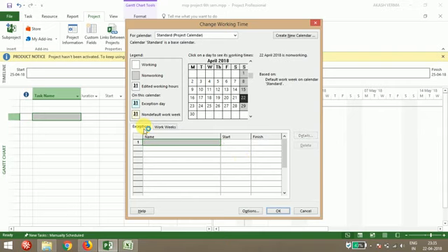Exception day means if there are any holidays between the start date and the finish date of the project, you can give the exception dates. After the start of the project, if you have some holidays like Holi or Dasera, and you want to give holidays for that. Suppose I'm giving 1 day holiday, I'm giving holiday A.